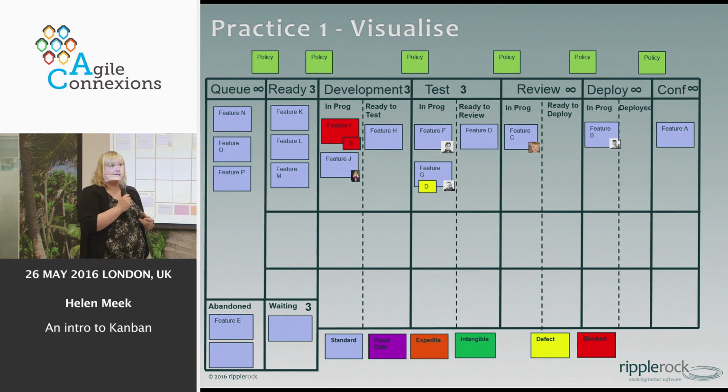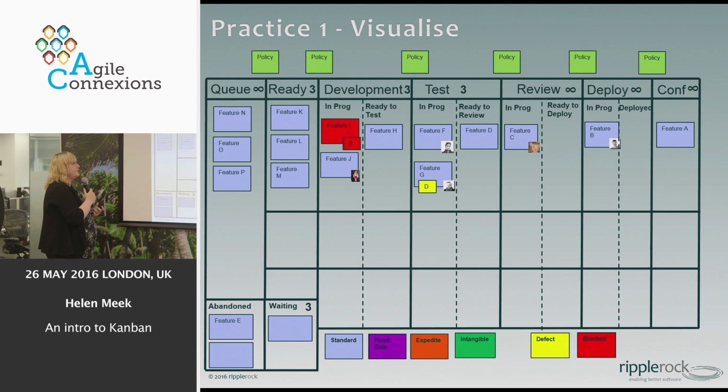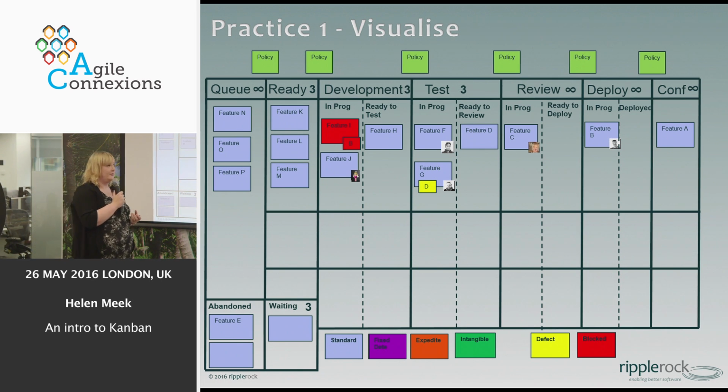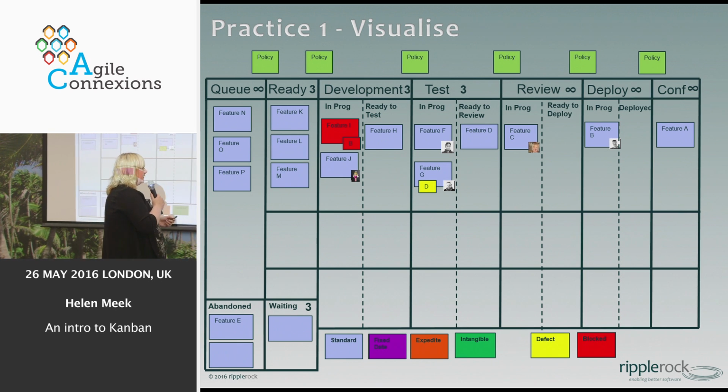And for those that haven't, then it's a good point to say, who doesn't know what they're working on today? What's the next priority thing? So we still have daily Kanbans or daily stand-ups, whatever you want to call them. We still do it around the board. They're still 15 minutes, same time, same place every day, but slightly driven in a different way. So that's visualization.